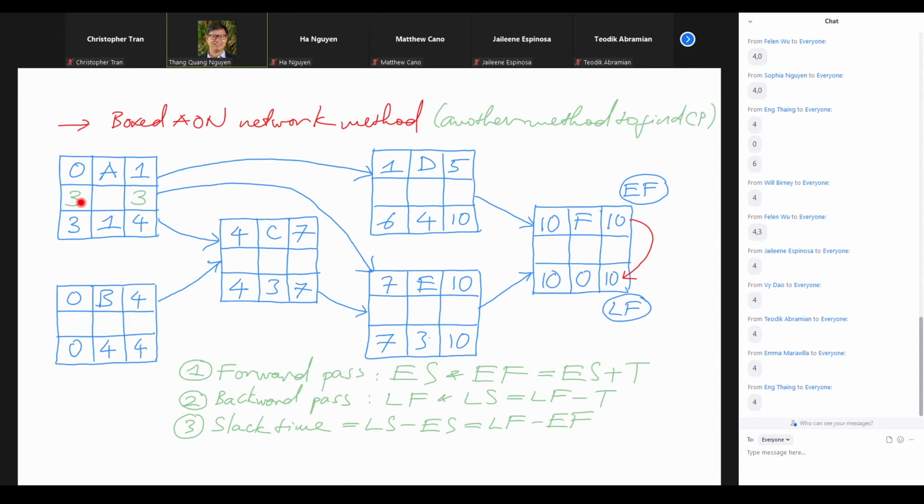Last time I drew you a picture, let me remind you. For example, I have this pen as our activity A right here, right? So now if we slide it down, which means that we delay A by some time, then when you subtract the 2 start points and subtract the 2 end points, the 2 subtractions must be exactly the same, right? So here it is the same, right? We subtract the 2 start dates, or if we subtract the 2 finish dates, they must be the same. So the slack time either here or here must be the same.